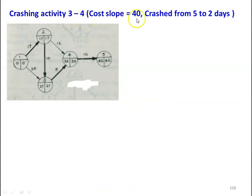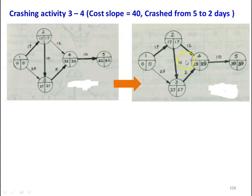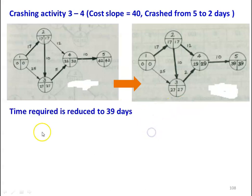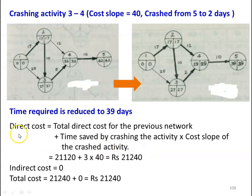Next, we crash activity 3-4 with cost slope 40, from 5 days to 2 days. The project duration is reduced to 39 days. Direct cost = 21,120 plus (3 days saved × 40) = 21,240. There is no indirect cost, so total cost equals 21,240.